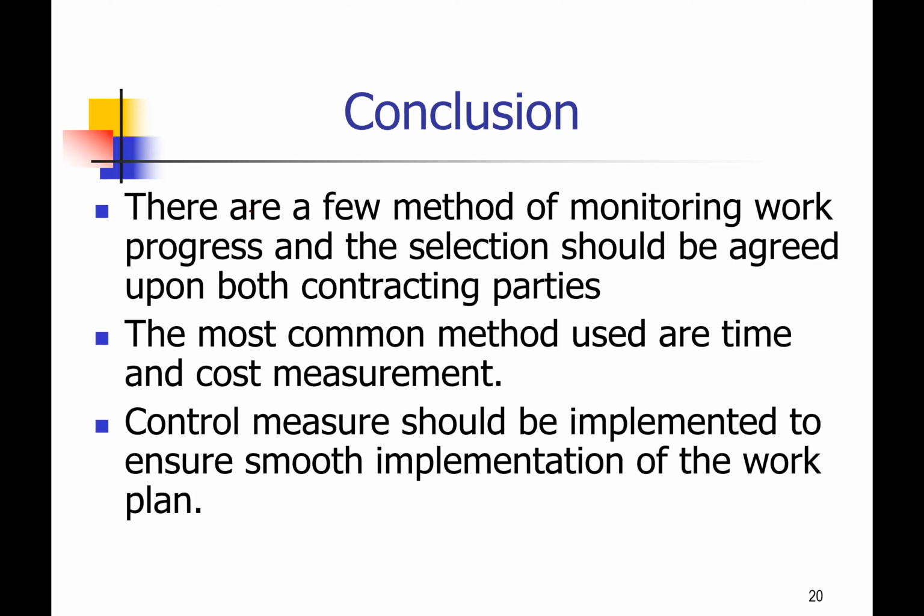You don't have to react immediately, because you might have a lot of things to do. So you focus on big deviation values first, because that requires immediate attention. The small thing, it is not to say you totally forget. No, you still monitor, but the reaction can be delayed a little bit because it is not that significant. Okay, so you take control so that, at the end of the day, your project can still catch up with the plan.